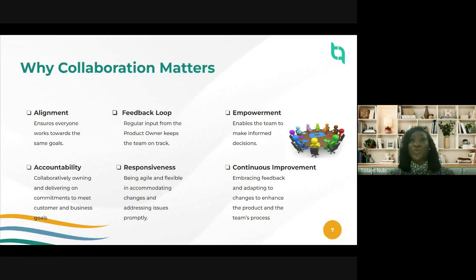So all those things will fit into your sprint planning discussion, after which you will have a board where you itemize all these tasks. And you can then start monitoring them every day. Check progress, check your goal. Are we still aligned with the sprint goal? Are we still aligned with what we need to deliver? Are we still aligned with the business value that we have actually committed to at the beginning of this particular iteration? So all these discussions with the team tie to alignment. That is basically how we are aligned.